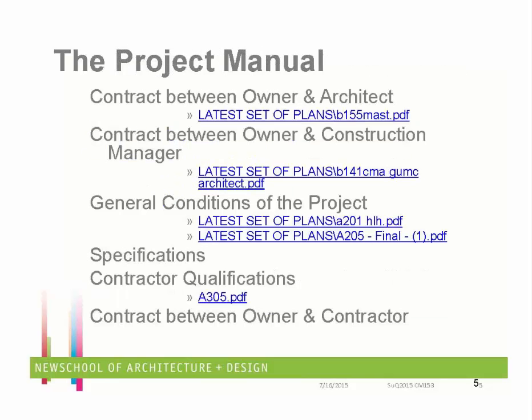So this is going to be interesting. That project manual, when I click on that link, brings up a 1,400-page book of specifications, a PDF file. In that project manual, it's got the contract between the owner and the architect. It has the contract form between the owner and the builder. It has the insurance requirements, the bid bond requirements. It has all of these things that if I'm going to be a bidder, I need to know so that I can put together a complete bid package.